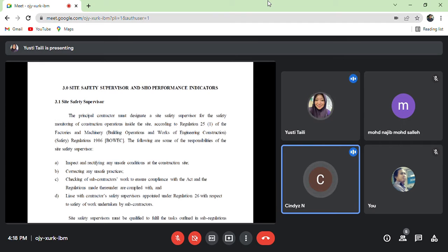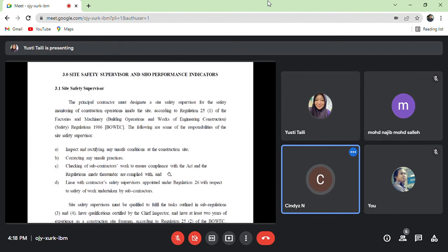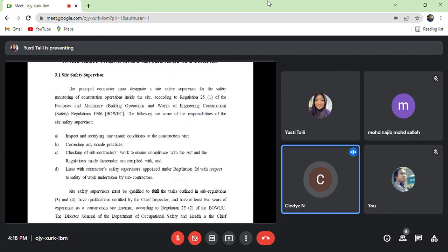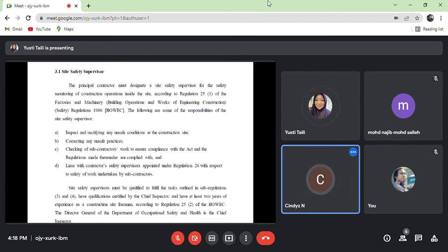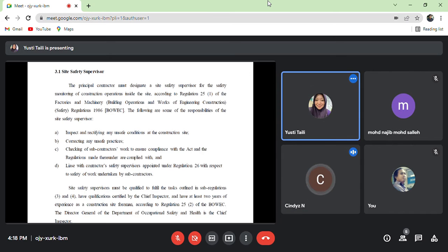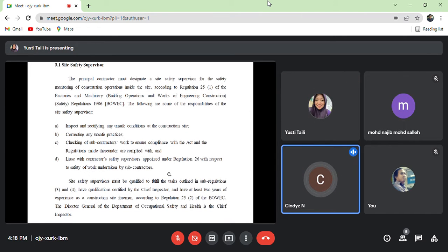Good afternoon, Doctor. My talk will be on the Site Safety Supervisor and the Safety and Health Performance Indicator. According to Regulation 25 of the Factories and Machinery (Building Operation and Works of Engineering Construction) (Safety) Regulations 1986, BOWEC, the contractor should hire a site supervisor for the safety monitoring of construction operations on the site.